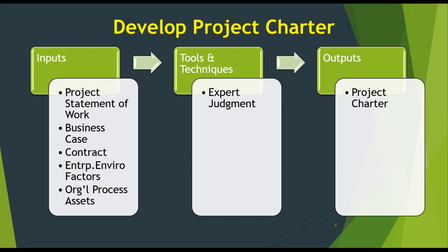So, developing a project charter. A project charter is a formal short document that states the project exists and provides project managers with written authority to begin the work. A project charter document describes a project to create a shared understanding of its goals, objectives, and resource requirements before the project is scoped in detail. So generally, what is included in the project charter? The project name, the scope, the purpose and goals, budget, deliverables, risk, roles and responsibilities, timeline, and milestones.